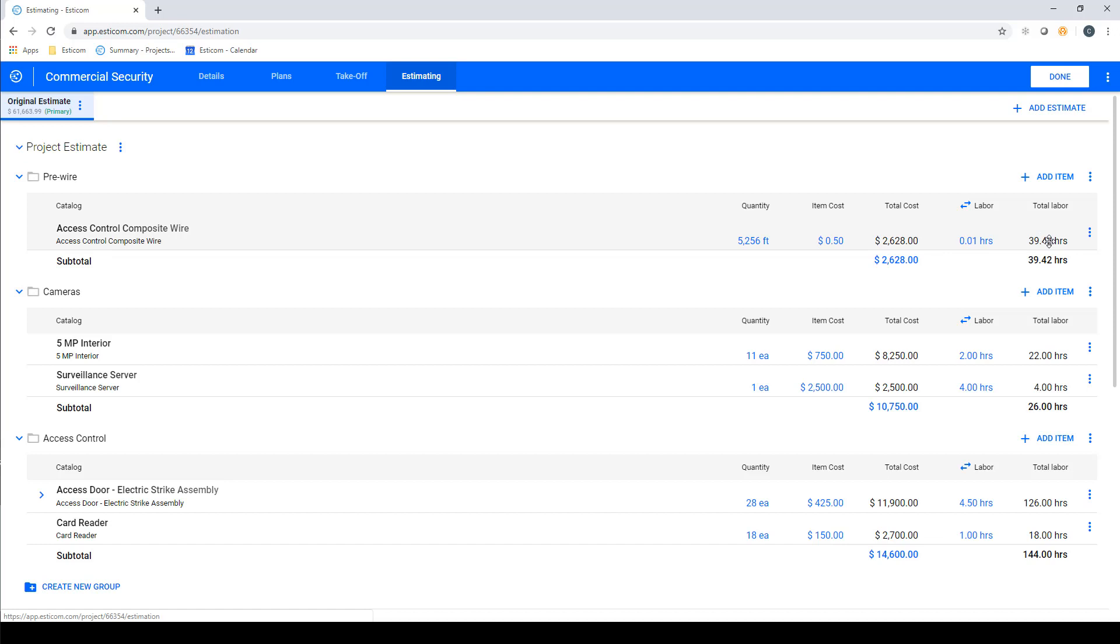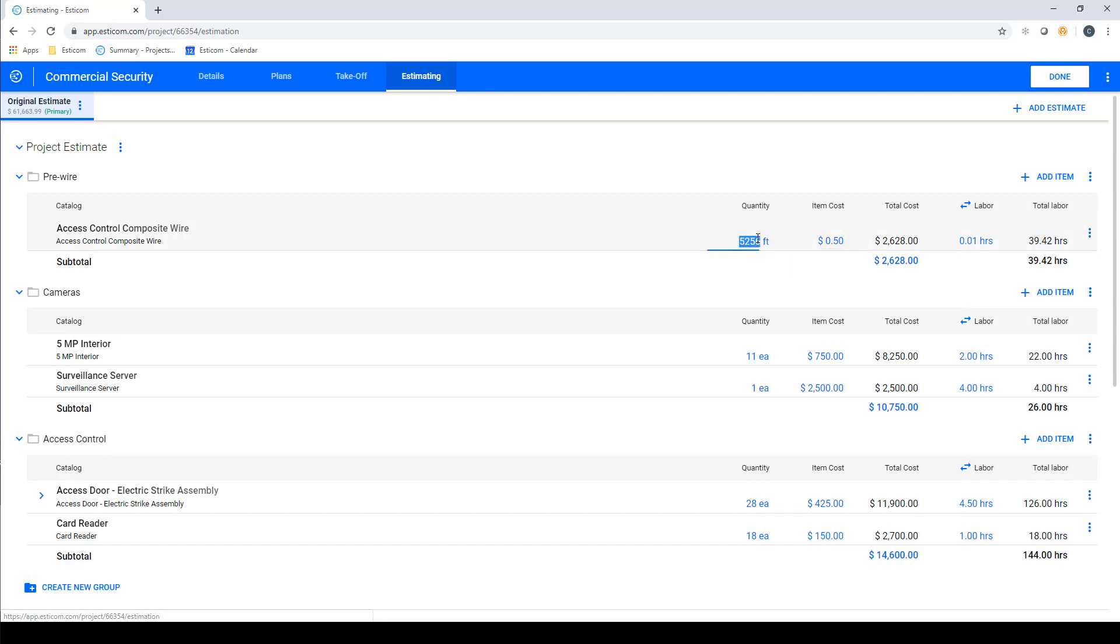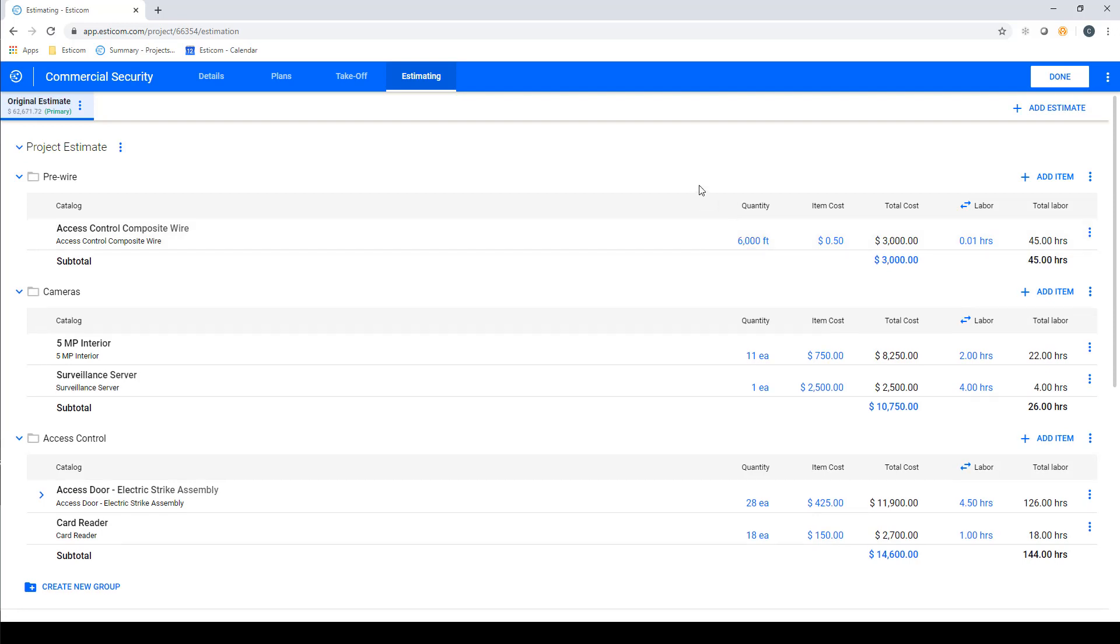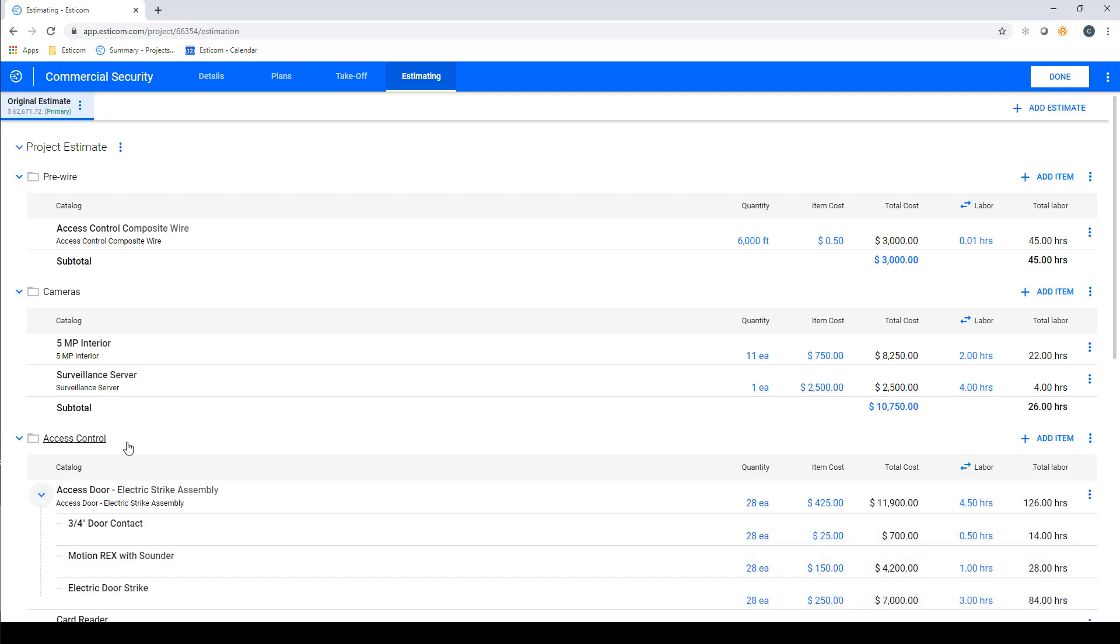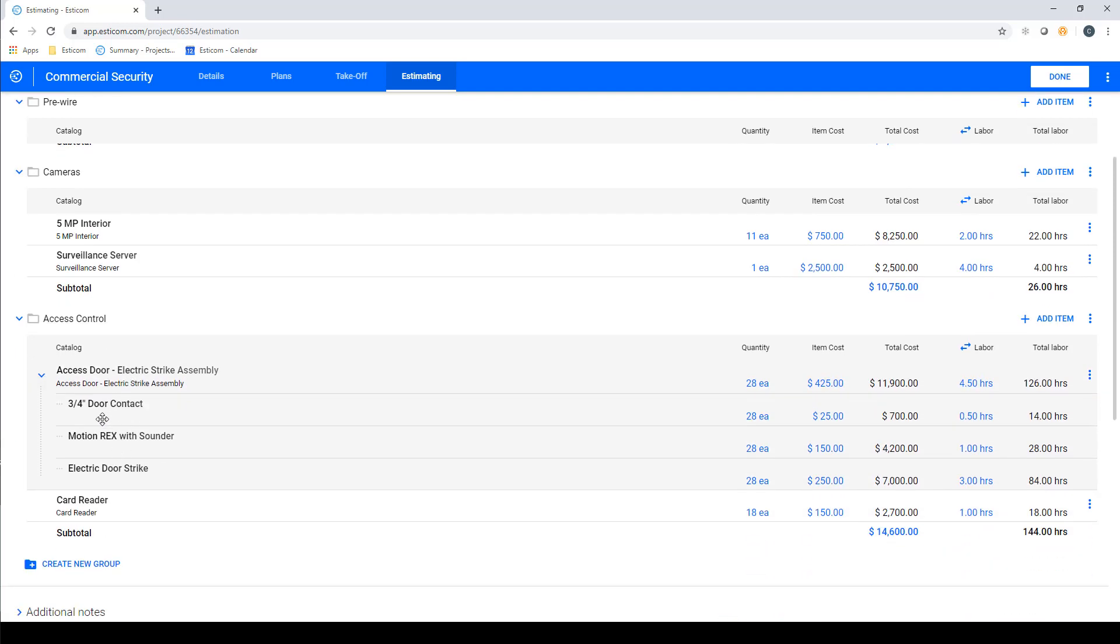We can edit the numbers in blue, and in this example, we'll want to increase our cable counts up to the purchase minimums. On some of the items, you'll notice a blue arrow, which signifies the item is a multi-layered assembly. If you click on the arrow, you can see the sub-components of the assembly, with the material and labor broke out in the appropriate ratios.